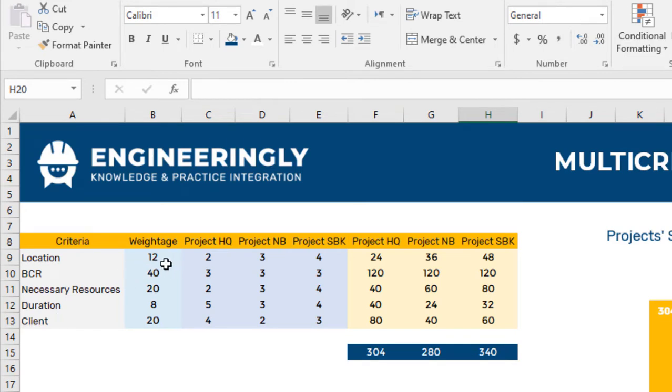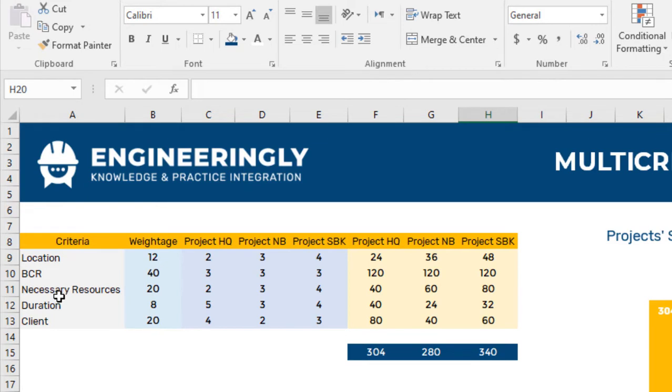In front of each criteria we have the weightage. For example, for the location we have 12 out of 100, for BCR we have 40, for the resources available in the company we have 20, for the duration we have 8, and for the client we have 20.